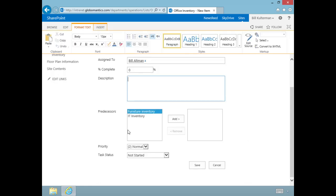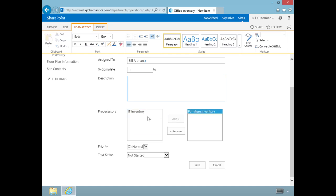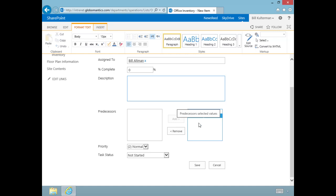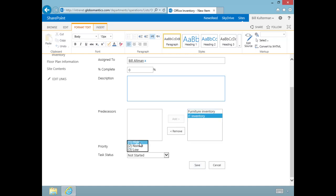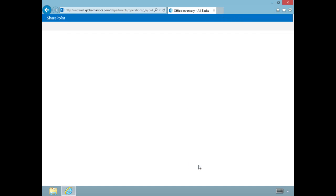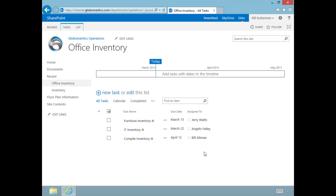We'll see our predecessors again, but this time to compile that complete inventory, both of these predecessor tasks are going to have to be done. We're going to add those, and for priority on this one, let's change it to high, and we'll click save. Now there is our task list.